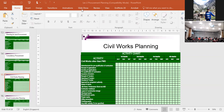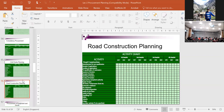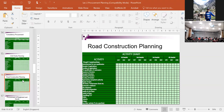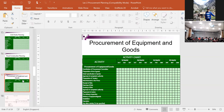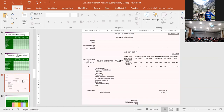Similarly, civil works procurement - whether through PWD or in-house depending on organizational capacity - has a well-defined activity plan for road construction. For procurement of goods, for example laboratory equipment, you follow certain well-defined steps from committee constitution to installation and operation. There are typically 10 to 12 generic steps needed in the procurement process.